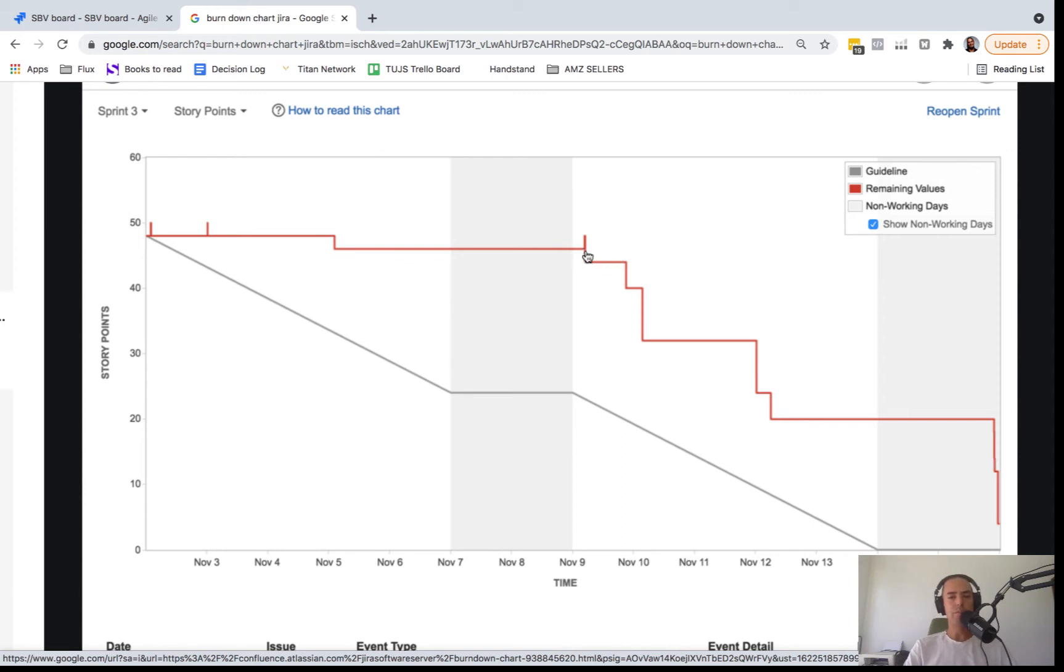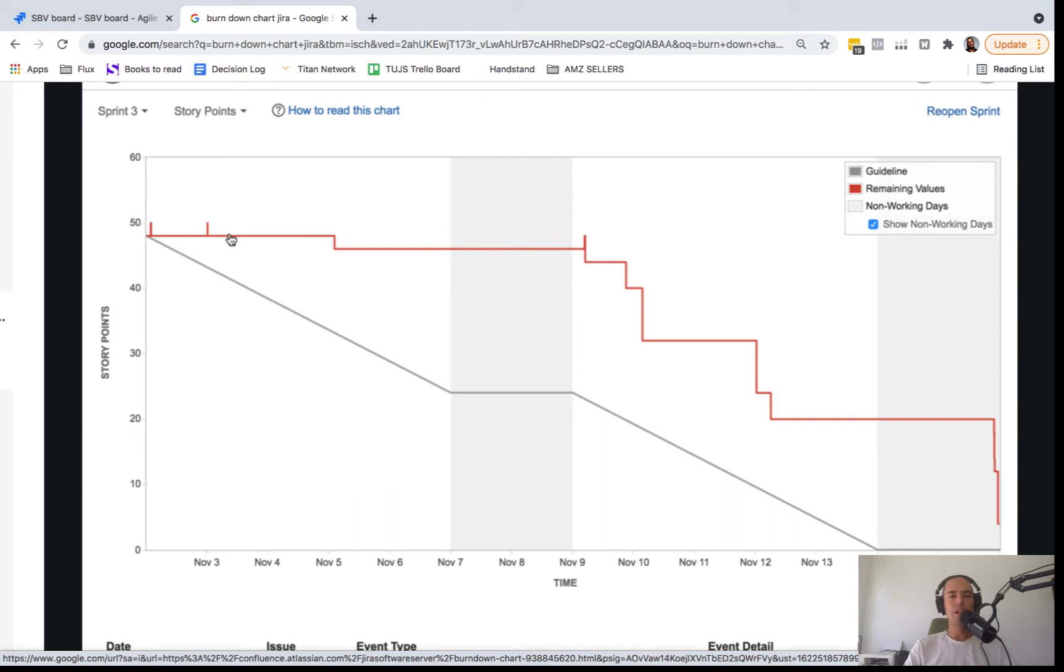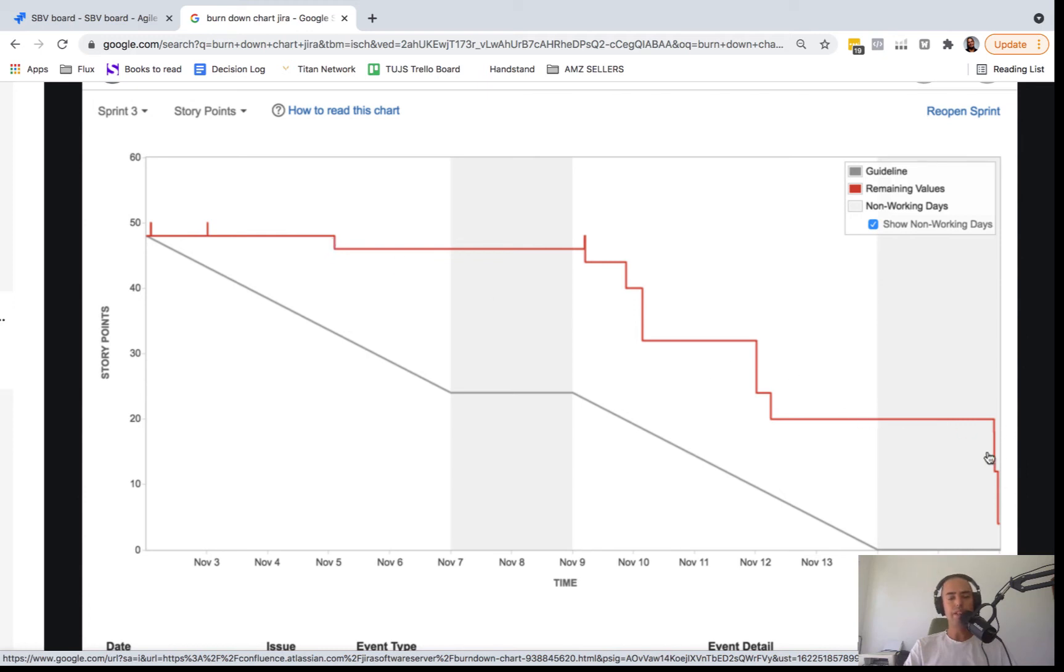Now you completed some more, it goes down. Maybe added some more. And every time you add something, you can look with your team and say why did we add things to here, because ideally we should not add anything in the middle of the sprint. We should just complete things. And see, this line is how ideally it should go. So you're slowly moving, the grayed out area is just a weekend. So if you touch that line every day, it means you're, except from the weekend because it's flat, you're going very well.